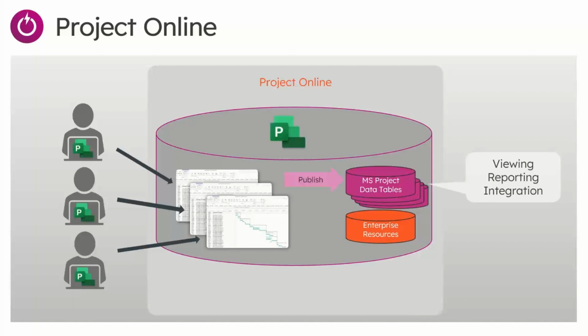Also, Project Online has an enterprise resource pool, and anyone who has been using projects in the Project Online context knows that there's a Build Team feature that allows us to put enterprise resources to work in our project, pull them into our project, and assign them work.